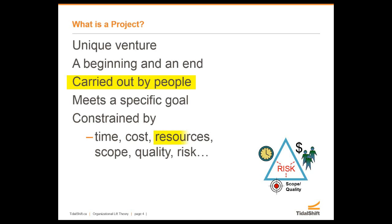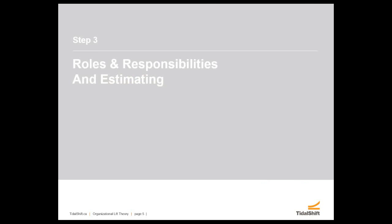When we talk in terms of constraints - time and cost are absolutely there, but we also have a constraint around resources. Do we have the resources we need? We're talking human resources, as well as equipment and supplies. But at the end of the day, people are a resource. We need to make sure we're getting the right people there, getting them there at the right time, engaging them, and dealing with issues. In our ten-step methodology, we bundled roles, responsibilities, and estimating because if we don't identify the roles and responsibilities first, we will not be able to effectively estimate.